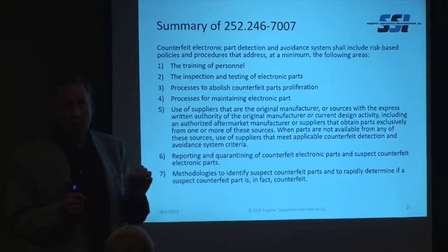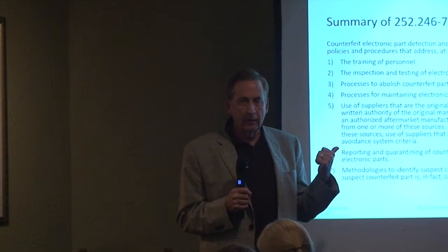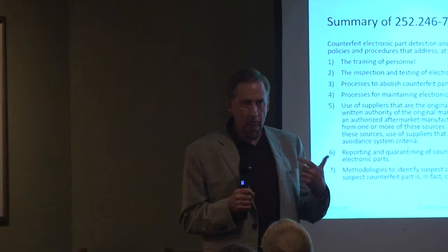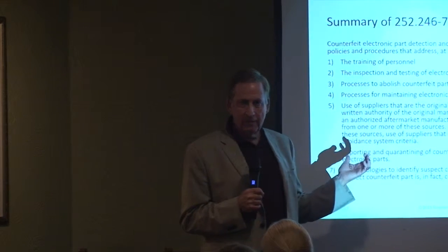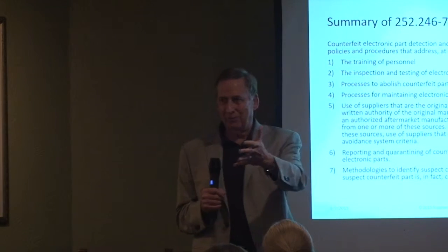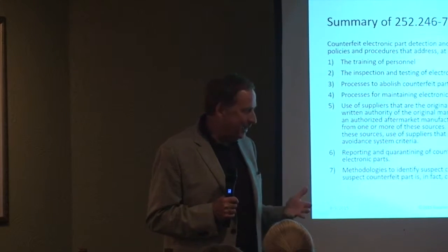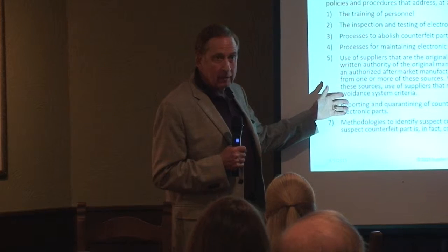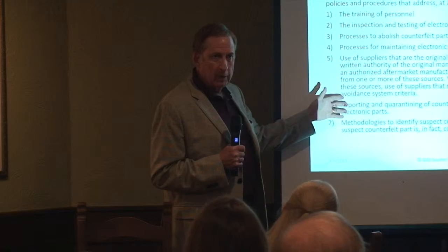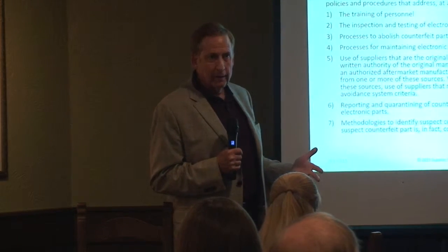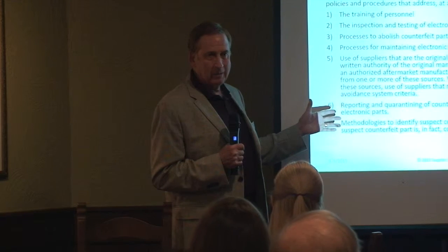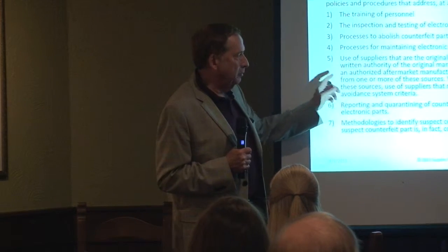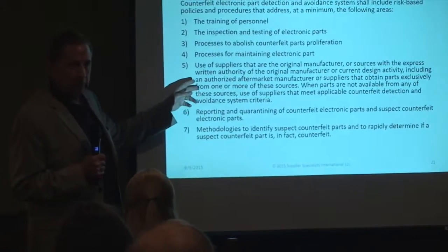So in a lot of programs, all the defense contractors would not only go to the original guys, but they would also go to distributors. But the problem has been with what's called an independent distributor, a distributor that is not licensed by the manufacturer. So think of it as eBay. I just made the example of buying some bad Microsoft Office on eBay, and it turned out to be counterfeit. I didn't know about it till I called Microsoft when I couldn't get it authenticated. There's been a lot of that stuff in our industry where people would have problems with lead time, or they try to find the lowest price bidder, and they go to these independent distributors. Guess what? A lot of the independent distributors buy it from that lady who's been standing over a hot plate, reflowing solder, removing parts.